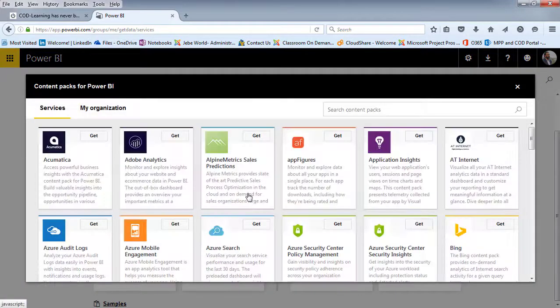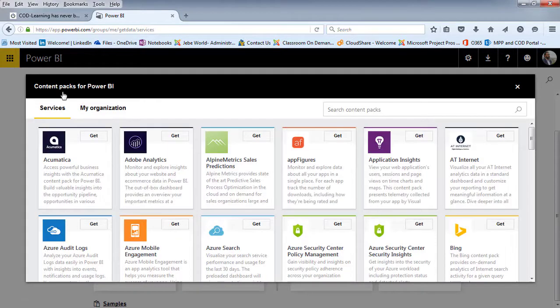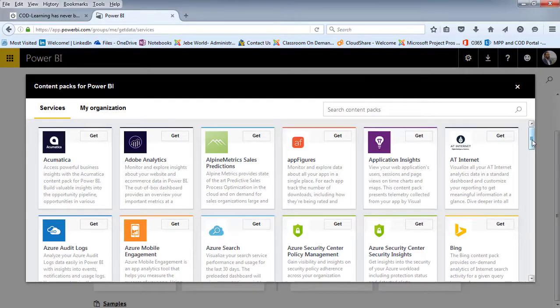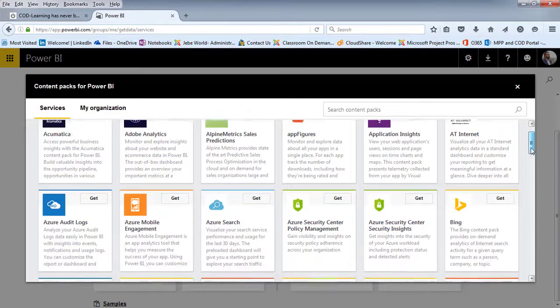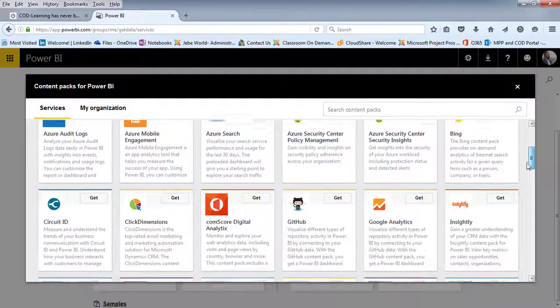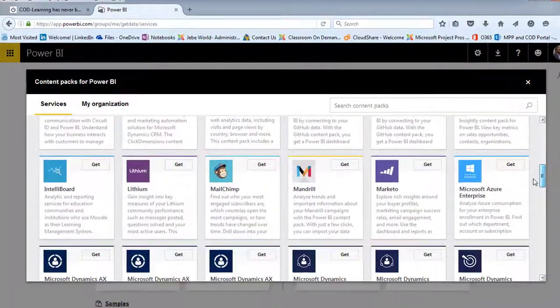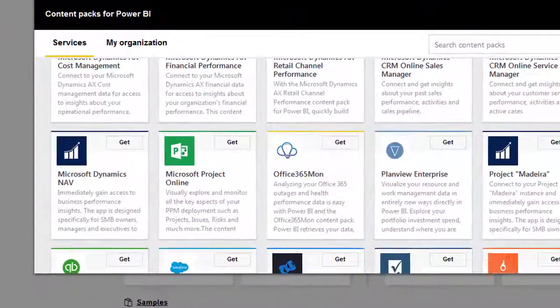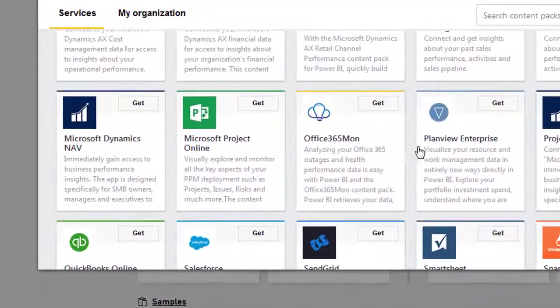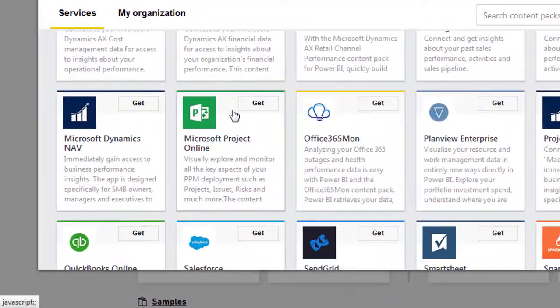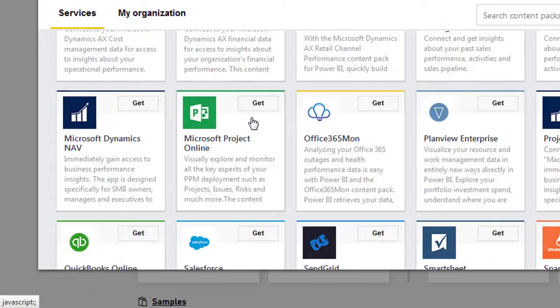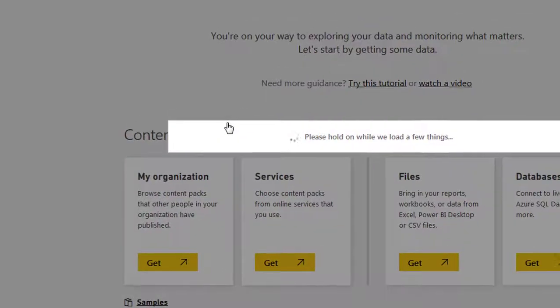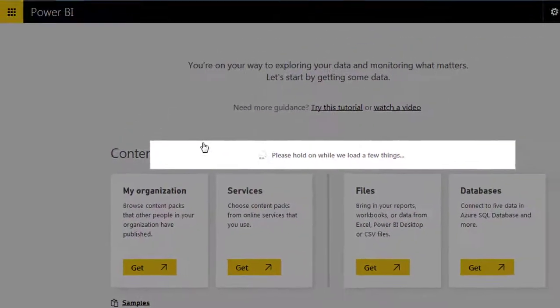When I click on the Get Data option, notice it is looking for Content Packs for Power BI. And what I'm looking for as I scroll down here is, of course, Project Online. And you'll notice there's the option there. So I'll click on Get in the Microsoft Project Online area.